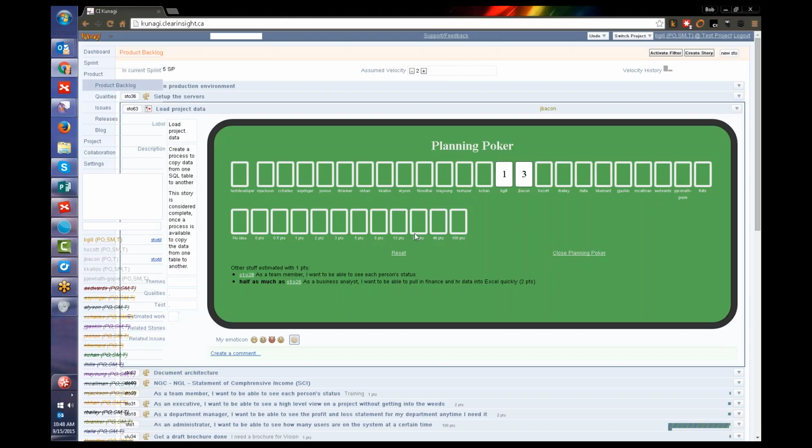So just to clarify too, if we're both working on the project, this is not each of our portions, this is the total, and we're just trying to make sure we have a complete understanding of what needs to be done and how long it's going to take for the whole project. That's right. Or the whole section of the project. That's a very good point. So the numbers here represent, I'll try and remember the wording of the question, but if I were responsible for doing this whole feature and I had nothing else to do, how long would it take me?